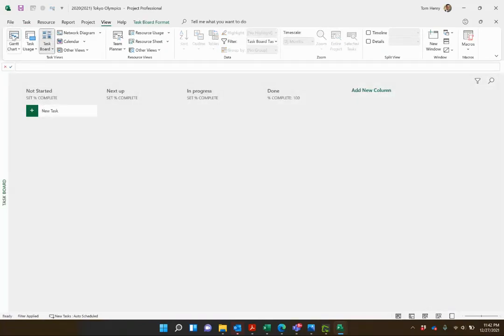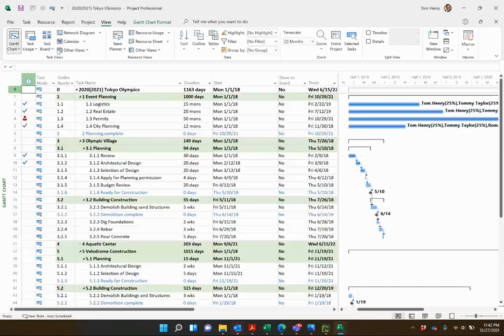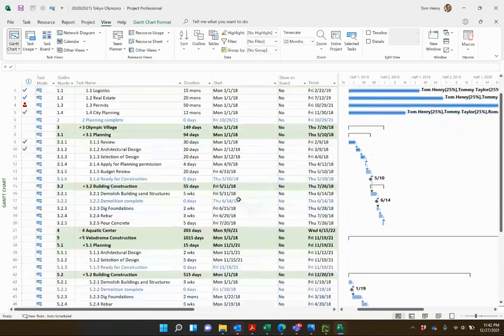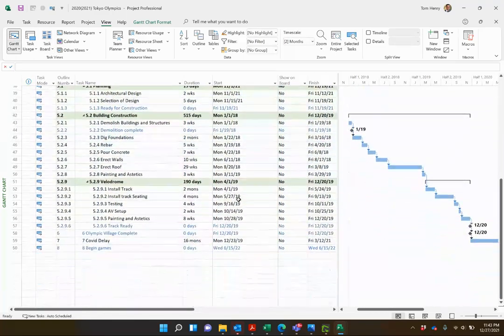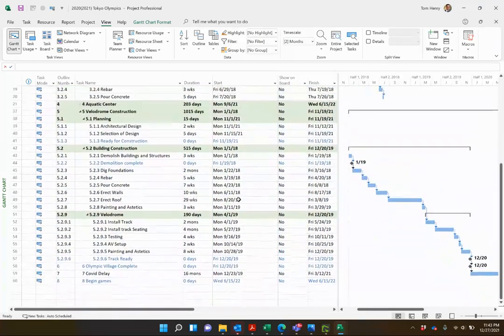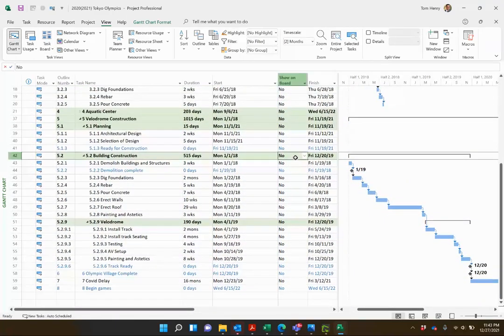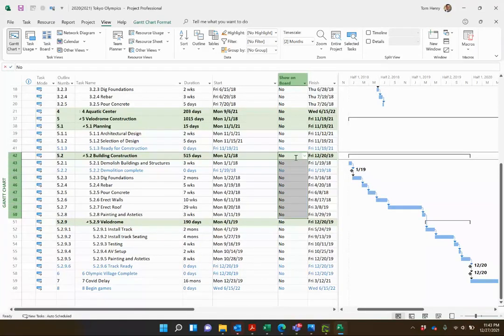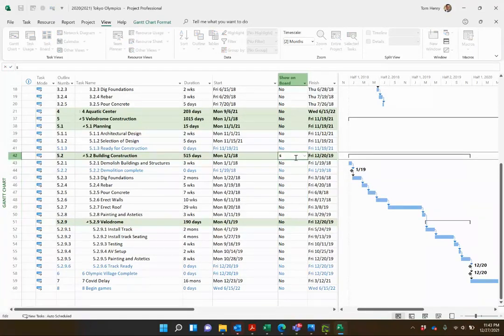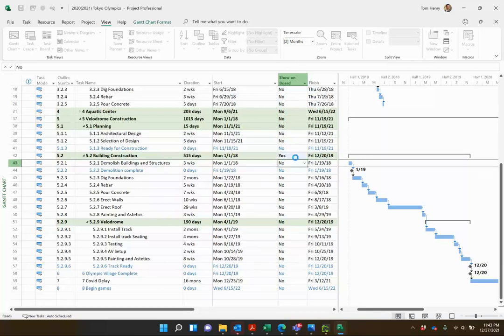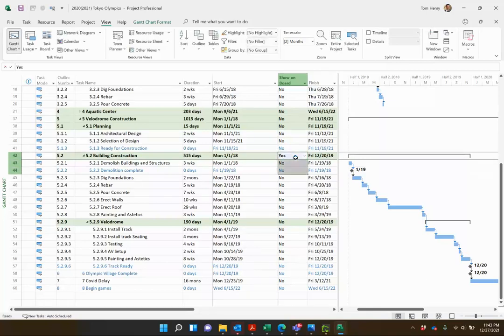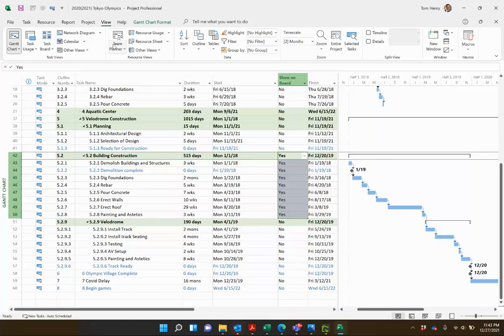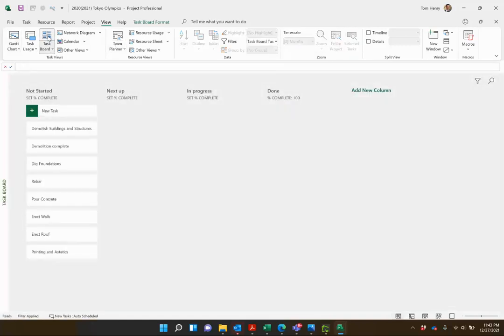If I go to the view task board, nothing's there. This is as if my project has no tasks. I'm going to come back and come down to building construction and mark these as yes. You can accidentally make the summary tasks included in this, but they don't show up, it's part of the filter. I'm going to come into the task board here and now I see all of my task board tasks.